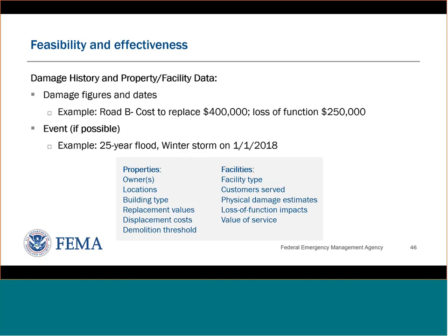What are the replacement values for the project? What are the displacement costs? These are the costs that come into play when you have to temporarily relocate your services and provide them at another location while repairs are made to the impacted structure. And then, what's the demolition threshold?